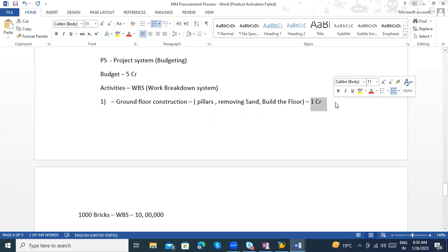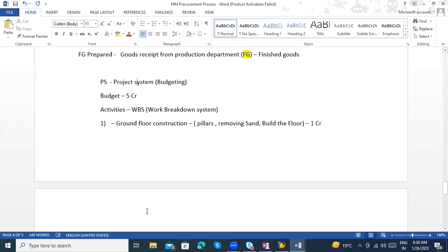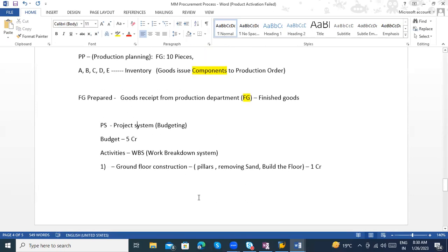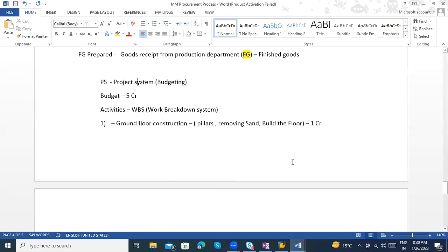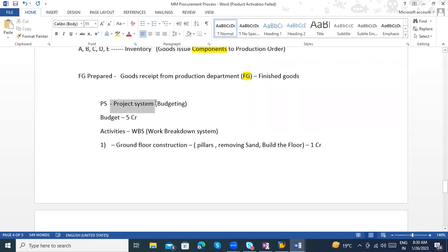Okay. So then what we need to do, again, we need to send to the project system team. This is the cost and this is what we are spending on this one. So currently the budget is not allocated, it's already exceeded. So they need to extend that allocation. Then again, they will go to the top management and take approvals to extend this 1 crore to 2 crores, like so.